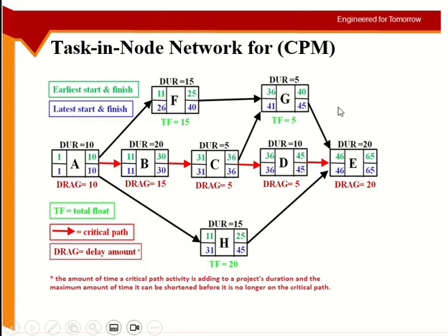So you have to put the early start which satisfies all the conditions, all the dependencies. This is the point. So 46 plus duration 65, including 46 itself. So you will get 65 here. So now we have put the early starts. Early starts are put. Now I will start putting the late timings.